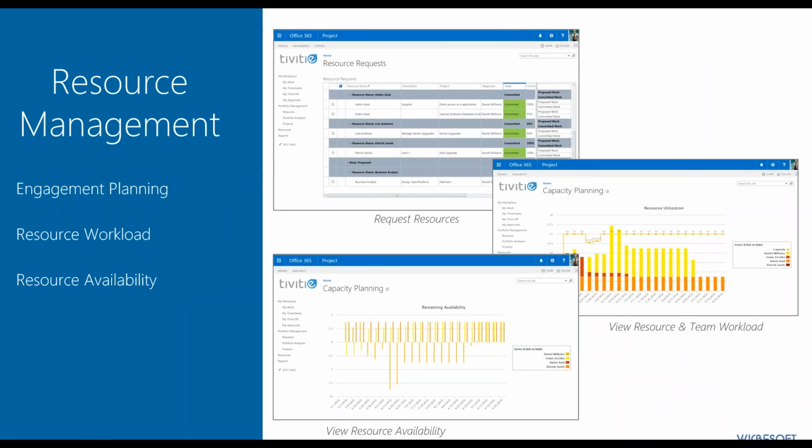Now, one of the opportunities we have by bringing these different tools together into a common portfolio of information in Project Online is that it allows us to do planning in each of these different tools, but then bring together combined capacity planning, whether it be the tasks or the resource estimates and workloads, so we can get an idea of what our demands are for our resources across all those solutions. Typically they've been in silos, or when people put them together, they were either done in spreadsheets off to the side that were disconnected from the process, or they had to be mashed up with some heavy manual effort in order to get that data combined.